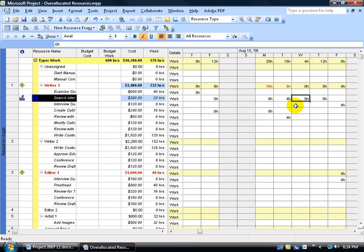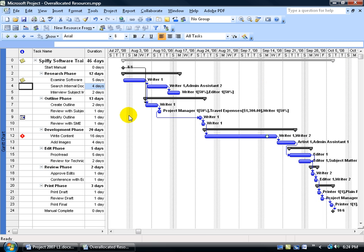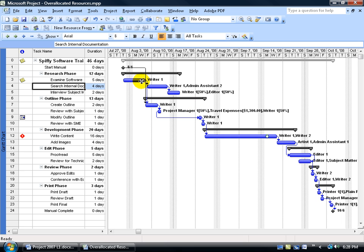If that's a little too confusing or you don't feel comfortable with it yet, that's okay — this is something to ponder when you become more comfortable with Project. To check Search Internal Documentation, right-click on the collapse view bar and go back to the Gantt chart. To oversimplify: instead of having the writer working on two tasks that start at practically the same time, you may want to have one task start later. Go ahead and move those tasks around accordingly.